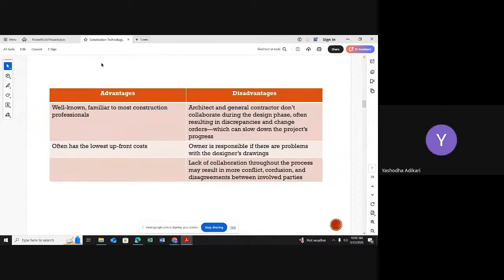And you are going to follow the tendering process. Following the tendering process means there are many options, many contractors, but between them you are going to select the most suitable person for the project. In this case, when you're selecting the most suitable contractor, you can select the most talented, most pre-qualified person for the project. At the same time, it helps to reduce the cost also. That means when you're selecting a person for the project, you're selecting a lower cost bid with some reasonable cost. So you can reduce your project cost by following this process.